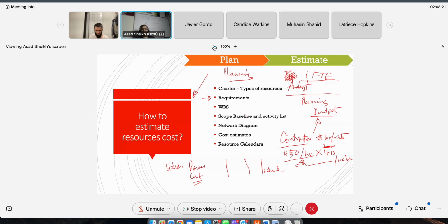First thing is you meet with the customer, you get the requirements, and then you break it down into a scope statement, right? And then you break the scope statement into your WBS, work breakdown structure. WBS is nothing but what deliverables I have to build when I move this project into the execution phase. In the case of a house, the WBS looks like the house, and then you have plumbing, you have electrical, you have this, you have that, all of those components. That's your WBS.